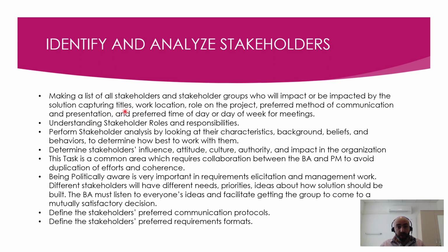And we should be capturing the titles of the stakeholders, their work location or the stakeholder group, their role on the project, their preferred method of communication and presentation, how I'm going to present these requirements to them, and preferred time of the day or day of the week for meeting.